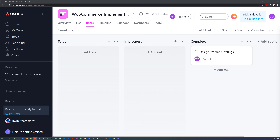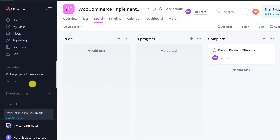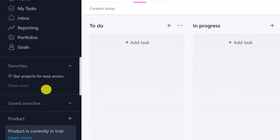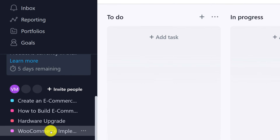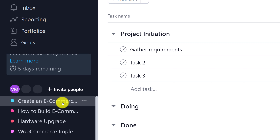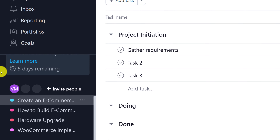The Kanban view I'm showing you is very cool for small projects. But imagine a large team — this view works extremely well for just one person or a small team, I would say under seven members. But imagine a team of a hundred members. This is where you would benefit from the structure I just showed you with the seven key milestones. The best thing about Asana is that it allows you flexibility. Let me switch to another project — I'm going to scroll down and select another project called 'create an e-commerce store,' and I'll show you how you can add all the sections into your project plan.